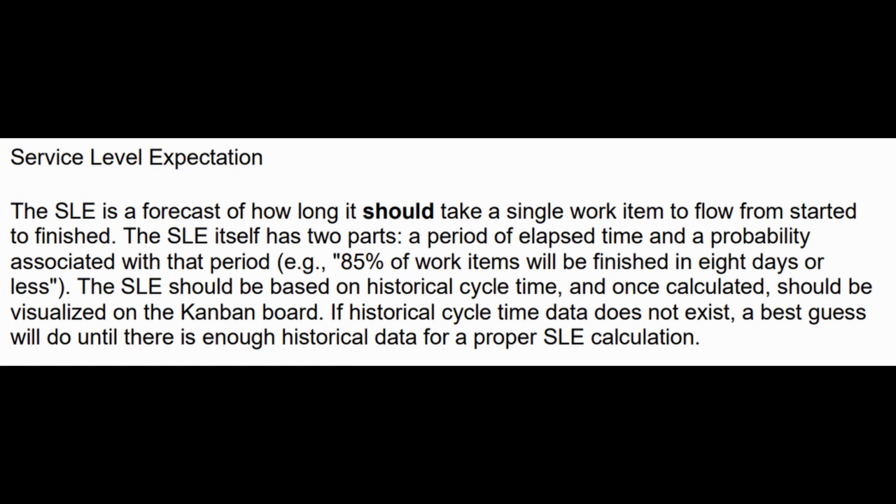Then the next one, Pratik. Yeah, the second one that the guide explicitly mentions is service level expectation, the SLE. We talked a little bit about this in the definition of workflow video as well, if you're watching this in order. It is a forecast on how long something should take. For anything that enters our system, how long should it remain in the system before it exits? It's a probabilistic forecast, not a deterministic forecast. It takes the form of how much time we expect something to take in the system, with what probability.